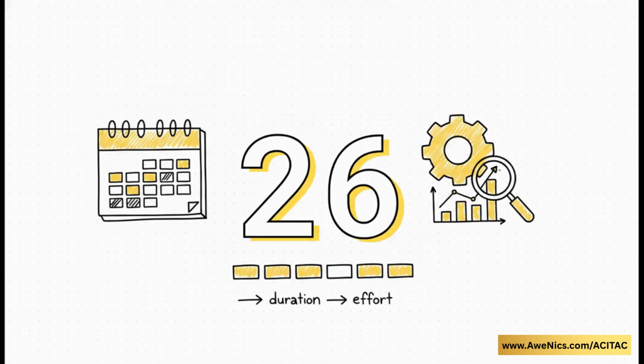And right beneath that is another magic number, days per month. The default sits at 20, which assumes a standard 5-day work week. But since we're working Saturdays, we actually have an average of 26 working days per month. Update days per month to 26. Seriously, if these numbers in the global schedule options don't perfectly match the math of the custom calendar you just built, every single duration and effort calculation the software does for you is going to be fundamentally broken.